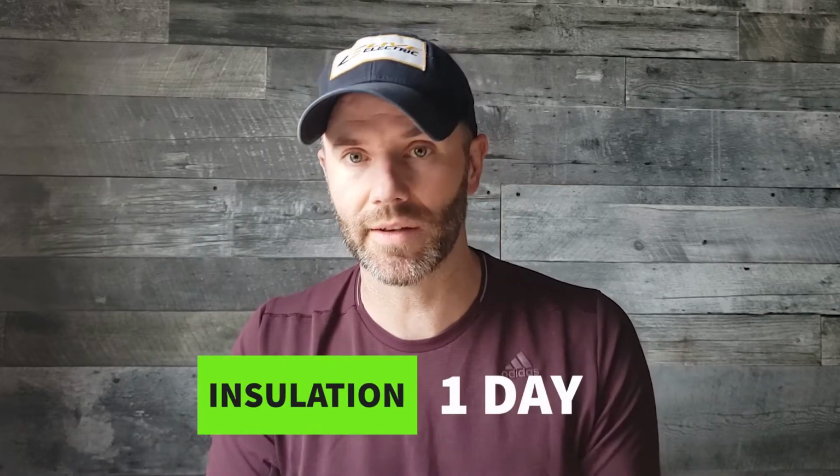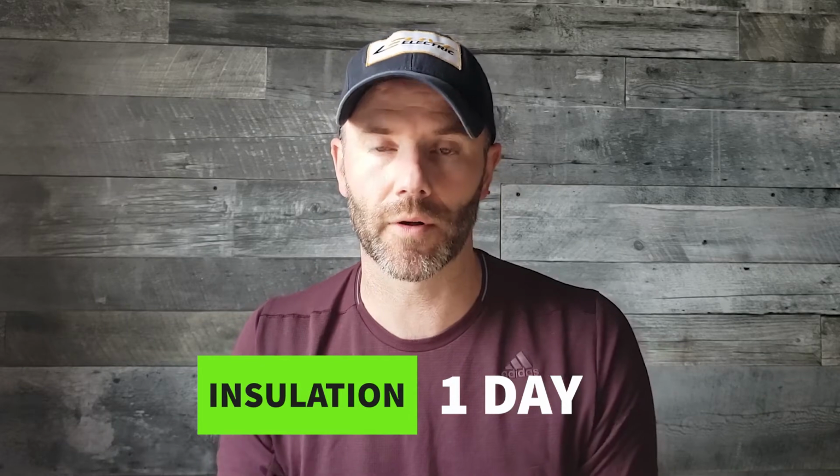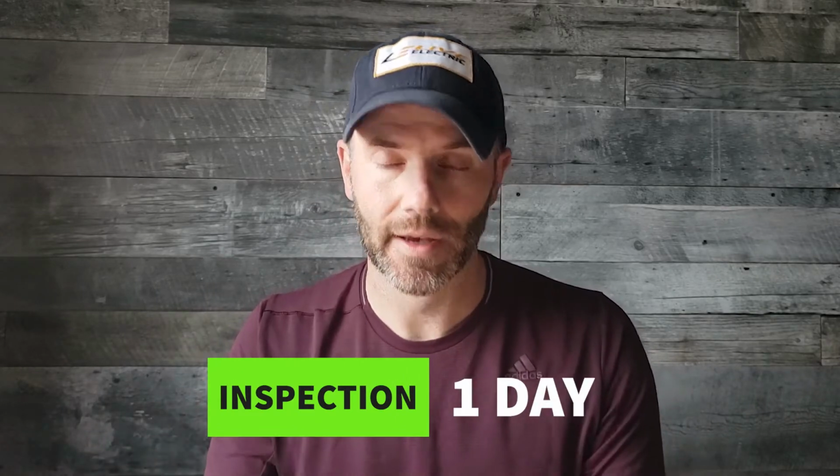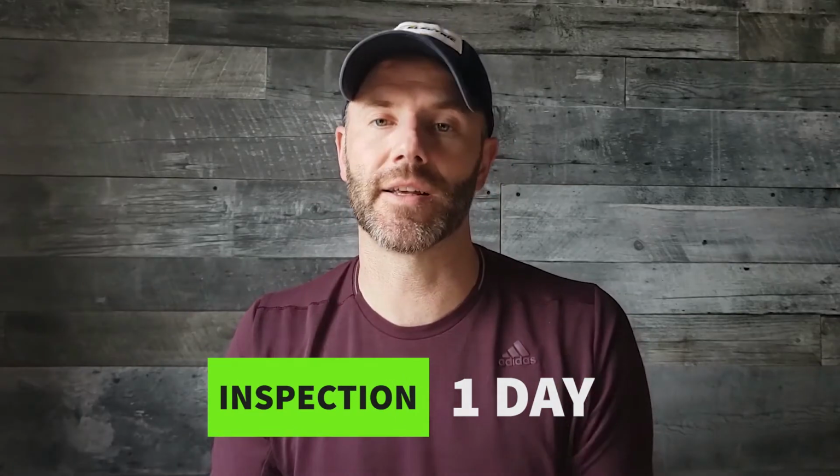It's not a full day. If you are going to insulate your walls, so insulate, vapor barrier, tuck tape, and so forth, add another day. Are you going to need to get inspection? That's a day, depending on what your municipality is requiring, and so forth. So we've got all of those.